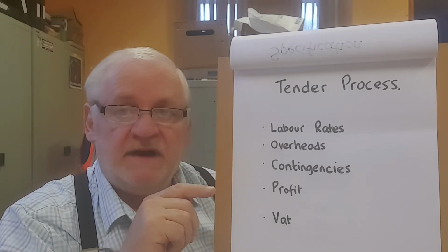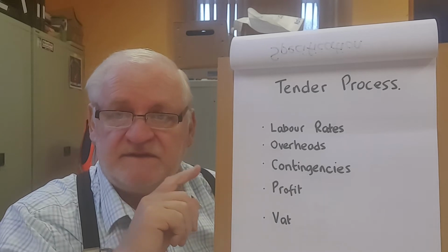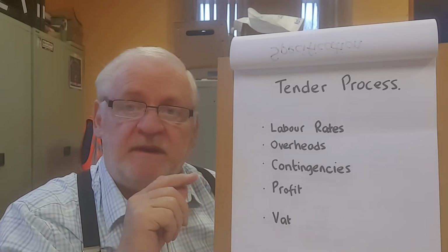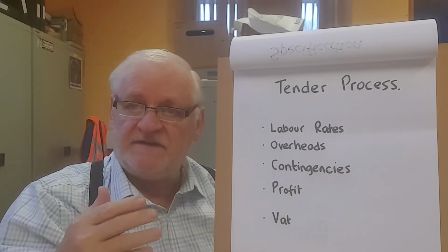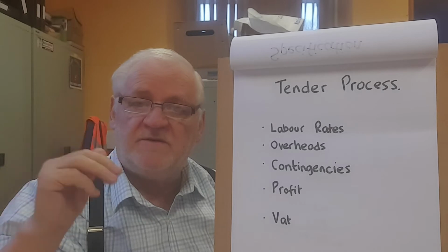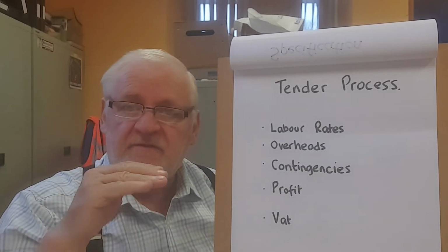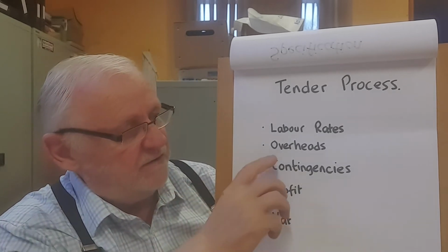Okay, it might actually be a higher rate. And the reason for that is because they may have to travel further to work. And it also might be harder to get the labor that you need, which means if it's harder to find the labor, then the rate will increase slightly. But in different parts of the country, the labor rate fluctuates up and down. The second thing we notice is overheads.